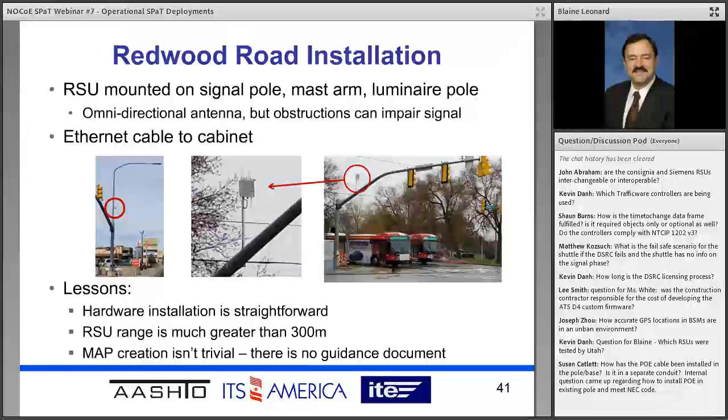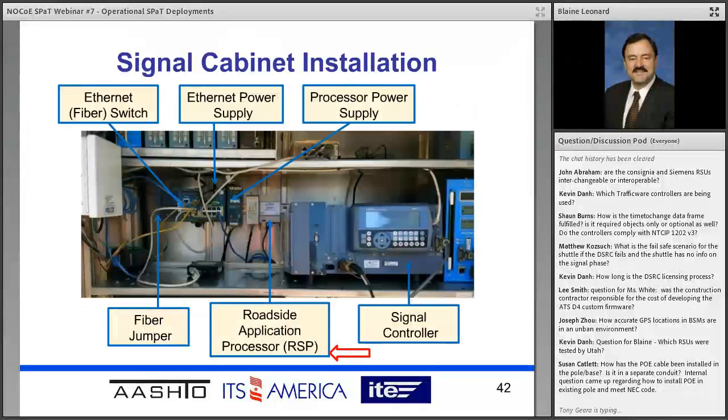Once you figure out where the website is and what to put in and make sure you have the right information, it needs coordinates of the location and elevation of the devices, a little information about the device itself and its antennas, and so that's how we've licensed the devices.